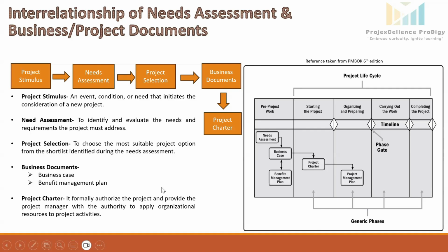Like we carried out the needs assessment, the detailed needs assessment. So we generated the report. So that will be the input for creating the business case and benefit management plan. And similarly for the project charter, the input will be the business case and benefit management plan. And in the next phase, while creating the project management plan, the project charter and all these documents will work as an input. So these all documents are interrelated.